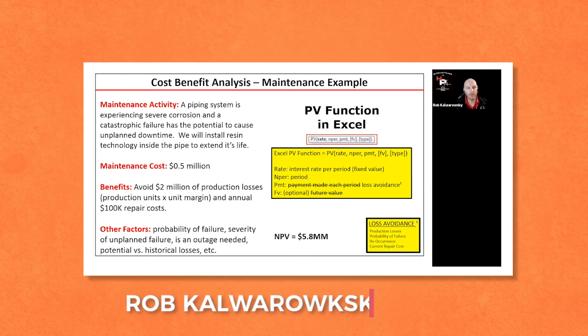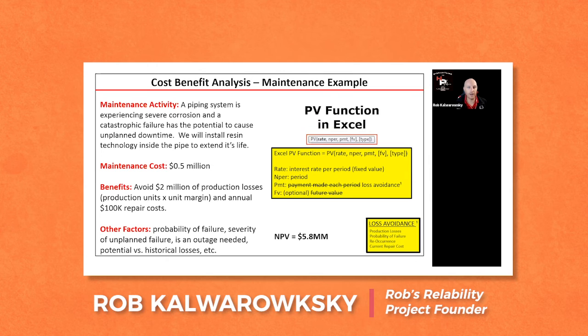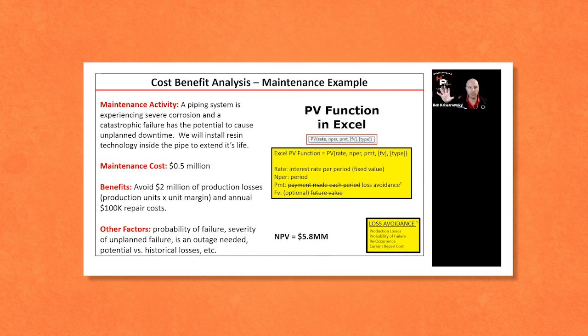I like to set a minimum, maximum, and median value for every input variable in my model. If you're super advanced, when I was doing it for an economics firm, we would put a distribution around every input, and then you could simulate the range of outcomes, which would come out as an S-curve. So you would have literally the ultimate best case scenario, which would almost never happen. You would have the worst case scenario, which would pretty much never happen. And then you would have the median outcomes, which are most likely to happen. It helps people understand the range of outcomes that you're worried about.